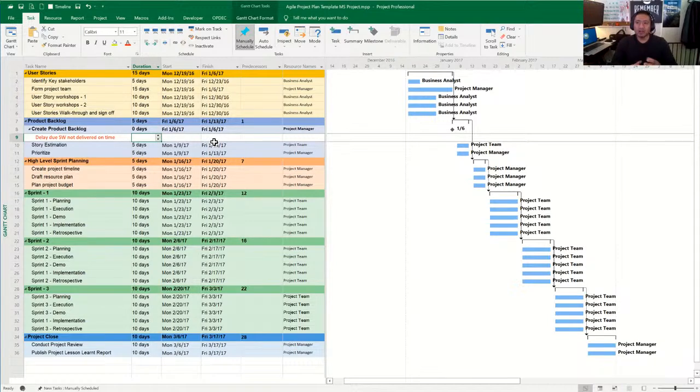My recommendation is not to baseline it, because that wasn't part of your baseline from the beginning. And if you baseline it, you're holding yourself responsible for it. So as you are developing this type of impact analysis, it's best to separate that within that task, just like you see here.